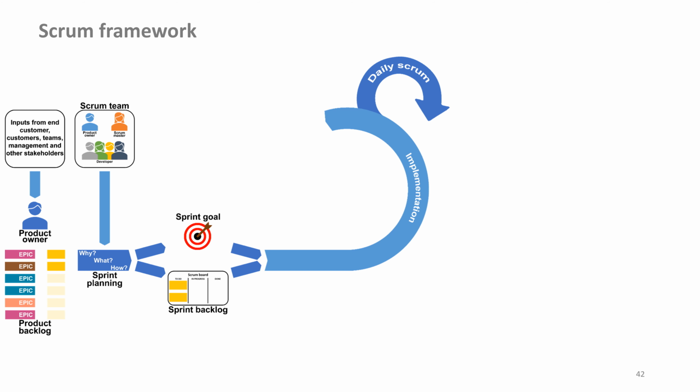The goal in Scrum is to have as few changes as possible in a sprint. That is the reason to plan smaller sprints. If we plan 4 weeks, we can only adjust our course every 4 weeks. Bug fixes are always a challenge in the Scrum environment. They cannot be planned because they occur spontaneously. This is more problematic in a 4-week sprint than in a 2-week sprint.